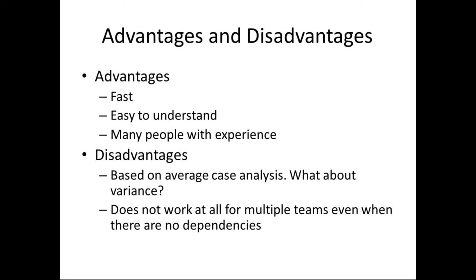Another team also has an average of 100, and it oscillates between 90 and 110. Intuitively, the first team has a lot more variance, a lot more schedule risk, because they're oscillating between 50 and 150, whereas the second team is moving between 90 and 110. But this standard approach treats both of those in exactly the same way, because the average velocity is 100.